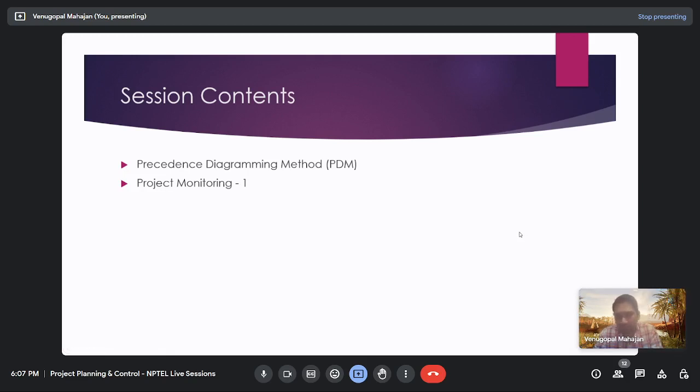The number 1 option is it involves shifting activities within their float to minimize fluctuations in daily resource use. Number 2 is one of the strategies of resource leveling includes interrupting an activity and resuming it later. And number 3 is resources can be leveled by extending the deadline of the project and keeping the daily resource requirement within available limit.